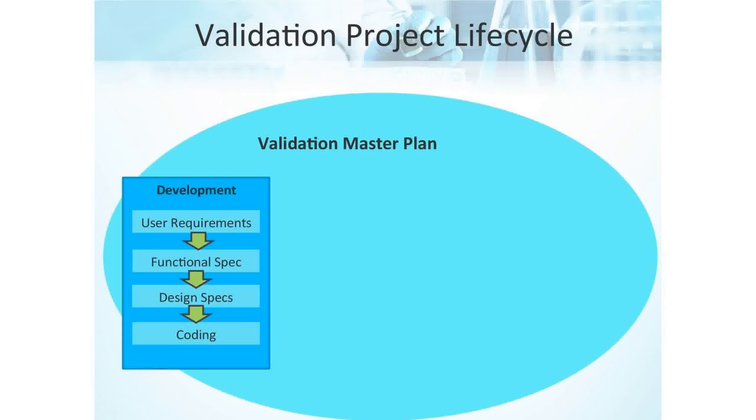Integration testing answers the question, has the system been designed right? These are requirements into the integration testing documentation and trace directly to the install qualification, and we'll also see that shortly. Even if you're not building custom code and you're implementing a commercial off-the-shelf product, all of the processes that the vendor used to design, build, and unit test the code must be reviewed and evaluated to make sure it meets the basic criteria of unambiguous, traceable, and validatable.